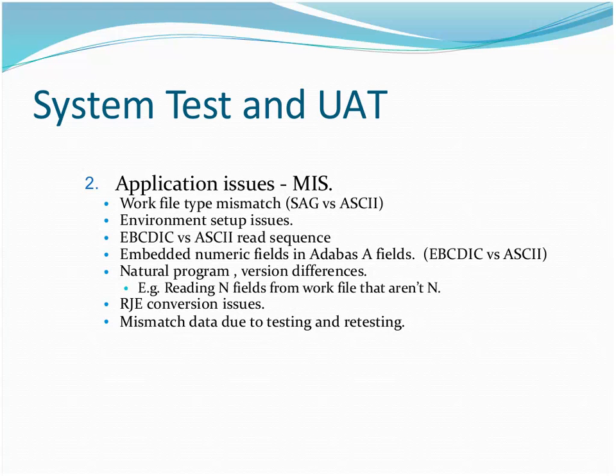As far as the RJEs, that was tough to convert because you really had to understand the programs and what the JCL did. So it was much harder to convert the RJEs than the JCL. And we really almost had to go through every single RJE job and test it and make changes to it. So it was a lot of work testing the RJEs.